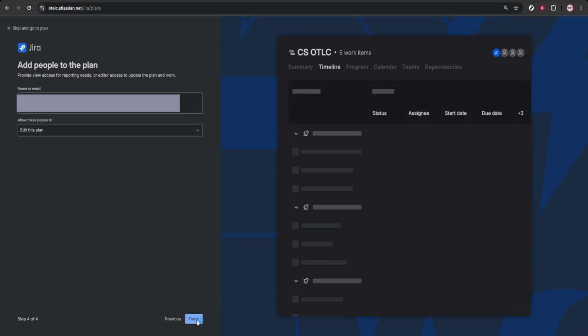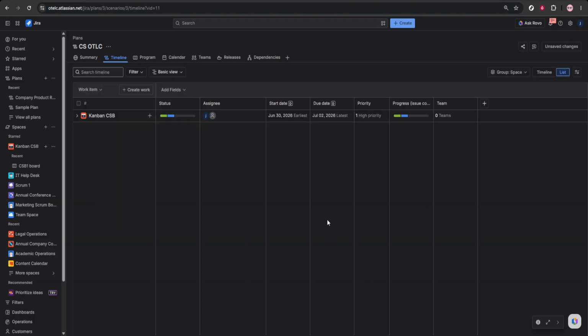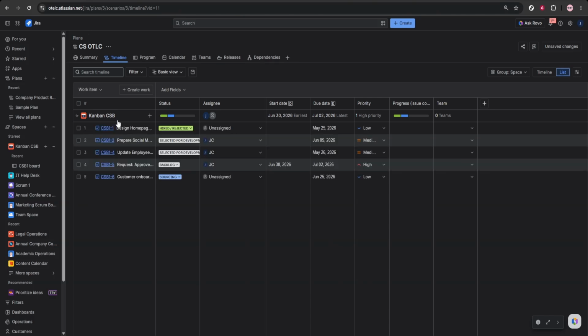Once your work is included, organize it using Jira's issue hierarchy. Structure the plan with initiatives at the top, then epics, stories, and tasks underneath. This gives you a clear way to connect day-to-day work with larger strategic goals. As you build that structure, group related work under bigger outcomes and review dependencies between teams so nothing important gets overlooked.